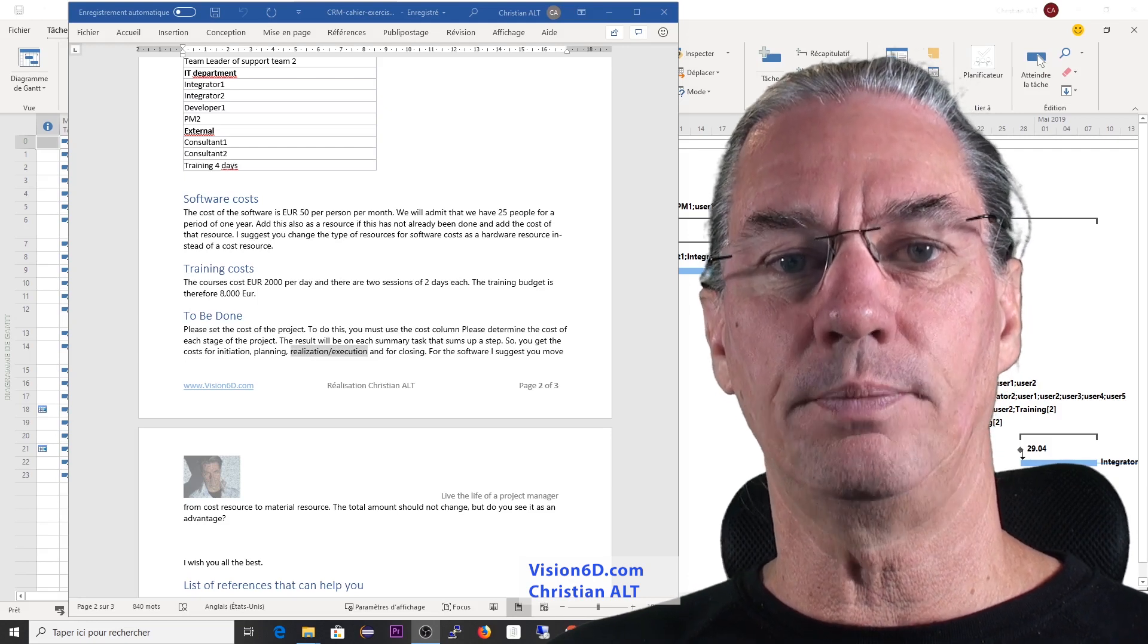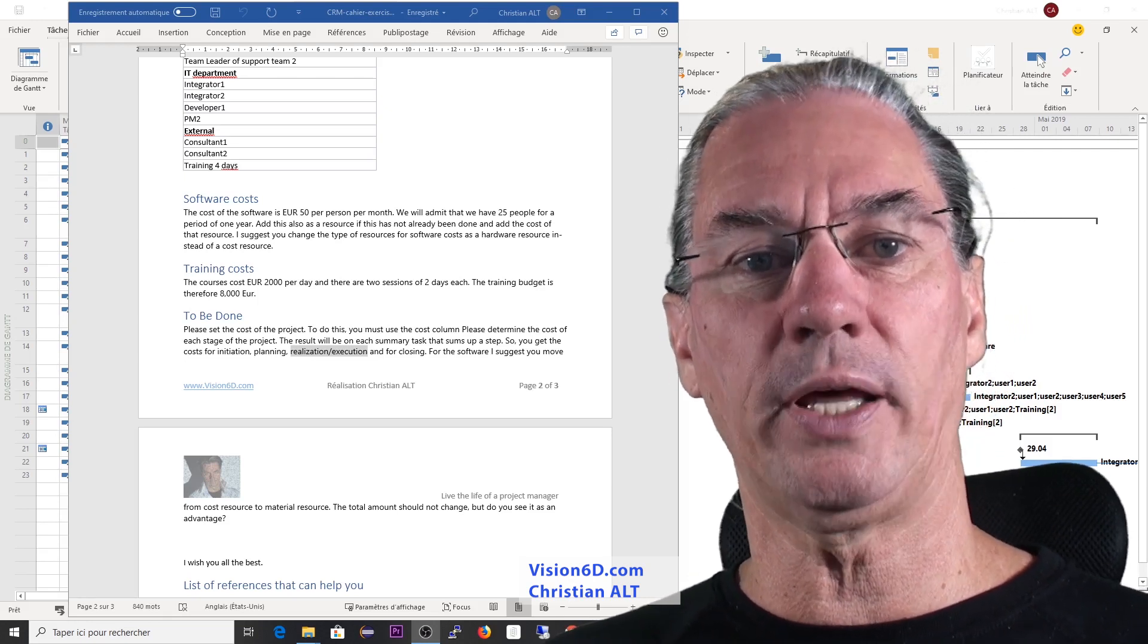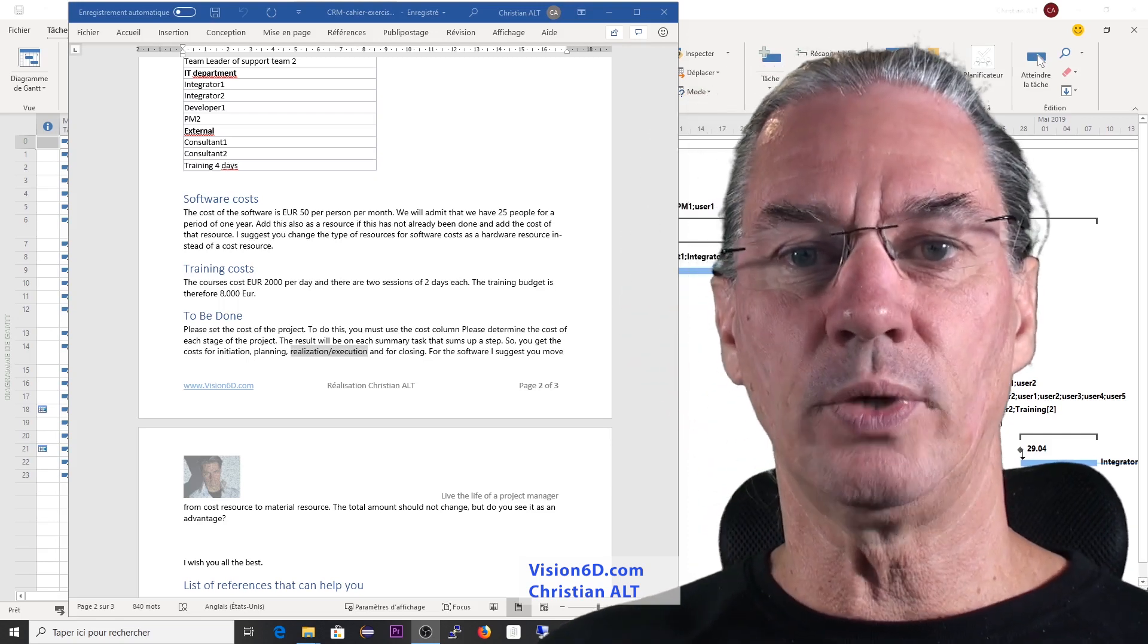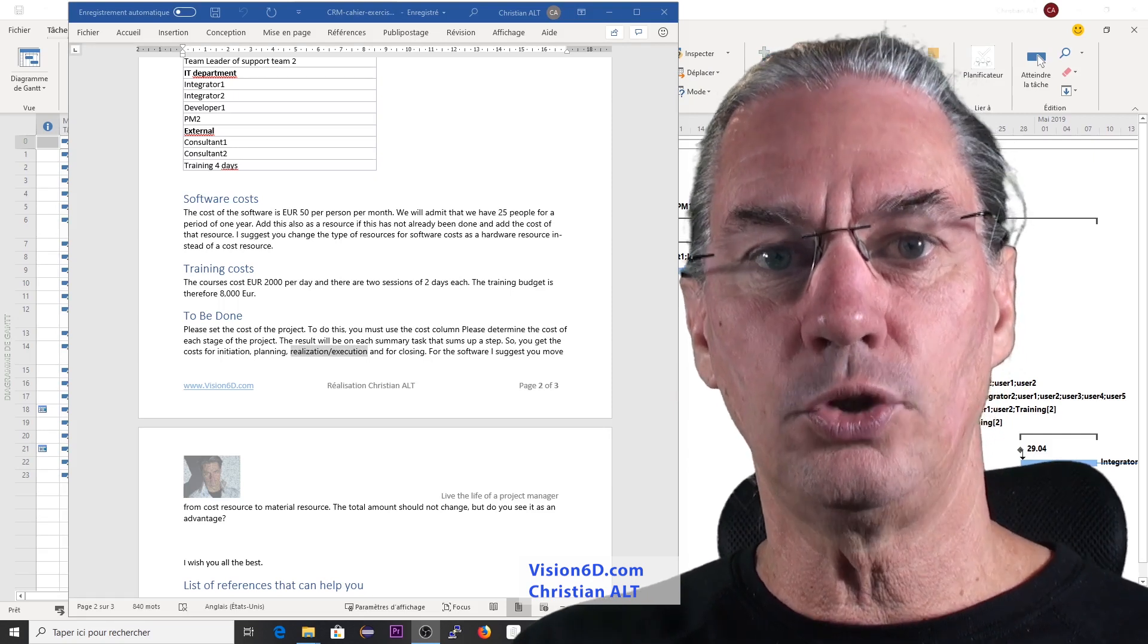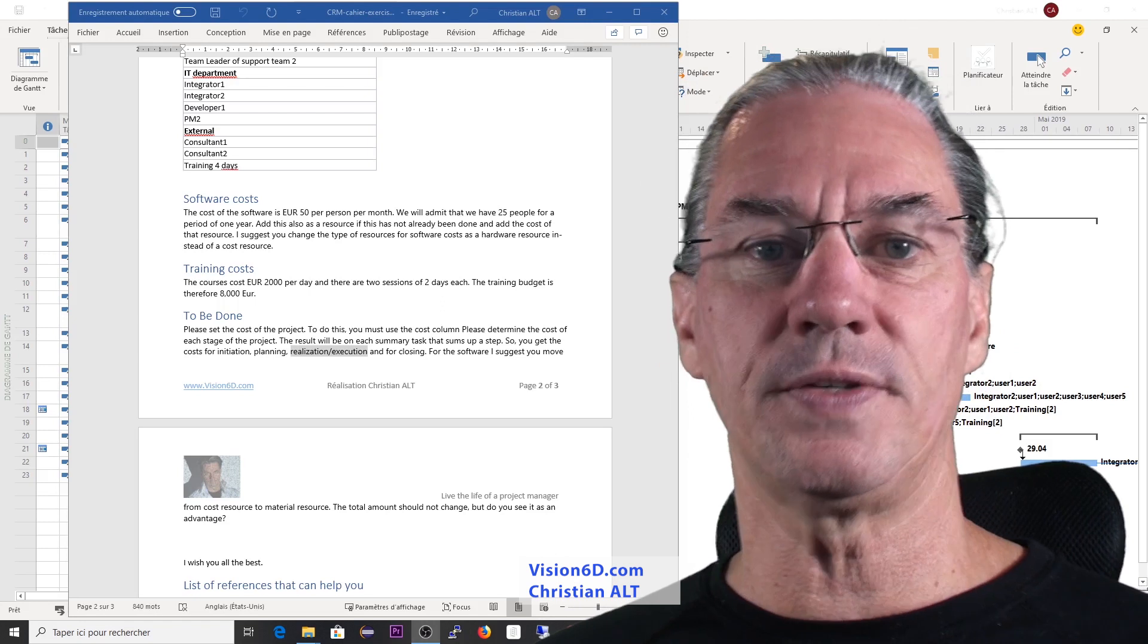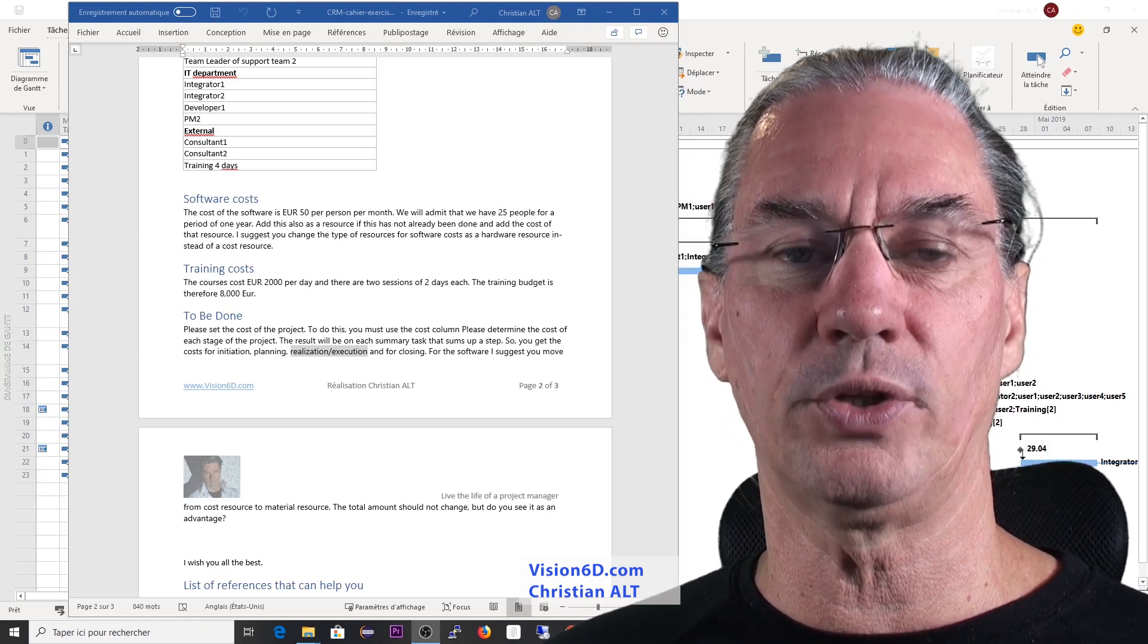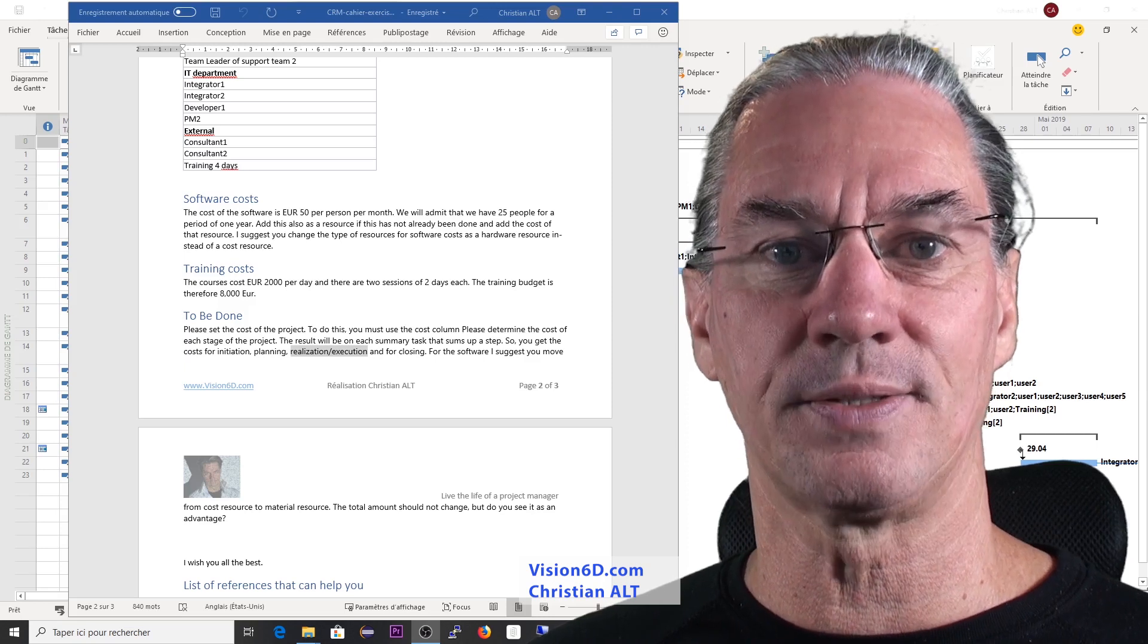So this is really a situation where we have a certain unit in the license and then a certain quantity. So I think it's good advice to tell you to work with material resources for the software license.